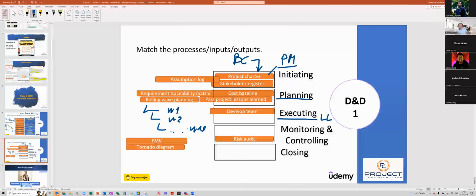That is an absolutely great explanation, Jay Kishan, because rolling wave planning was, I would say, the very first agile way of doing things, because you do not wait for all the requirements to be ready. Instead, whatever you have available, you get started. Who sets the threshold of when we get started is all set by the project manager or the project team. Theoretically, you can do multiple waves. Nobody will hold you back, but you need to remember that technically you're creating, let's say, if you have 10 waves, 10 mini projects for yourself. At any given time, you might have, I don't know, 5 in execution, 2 almost closing.